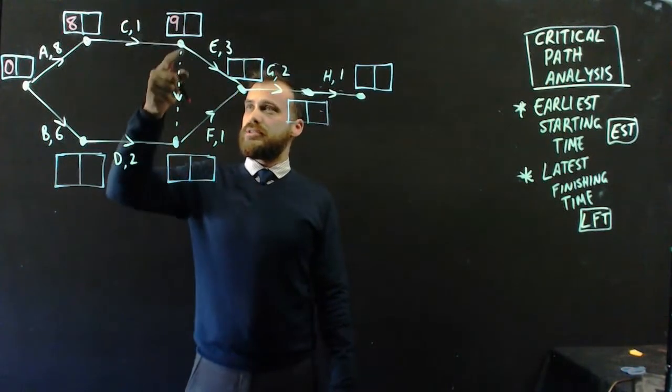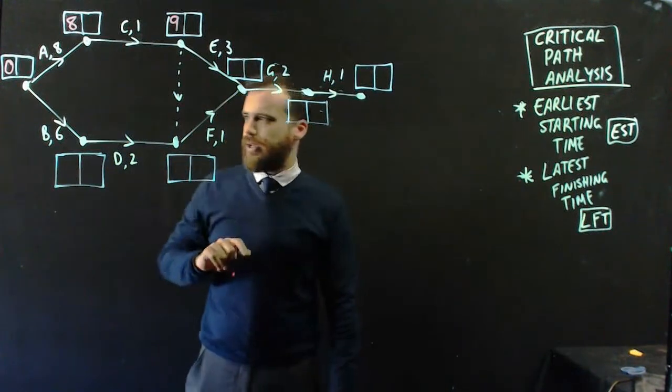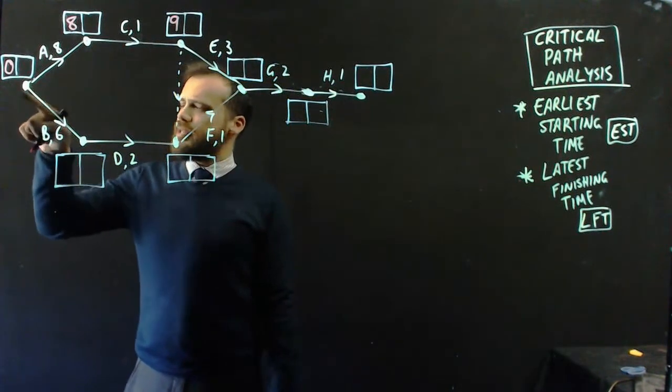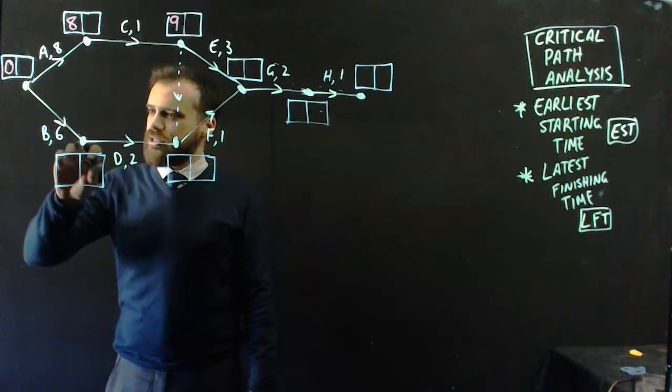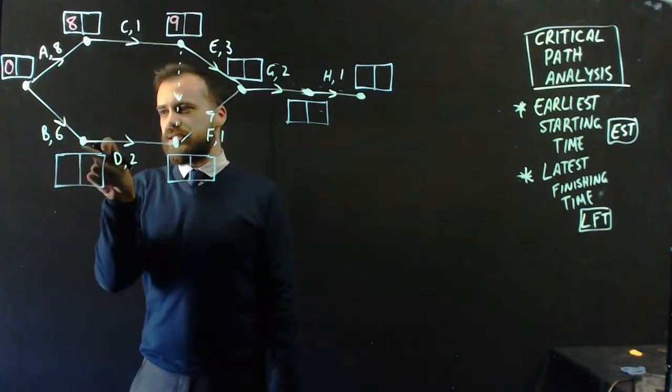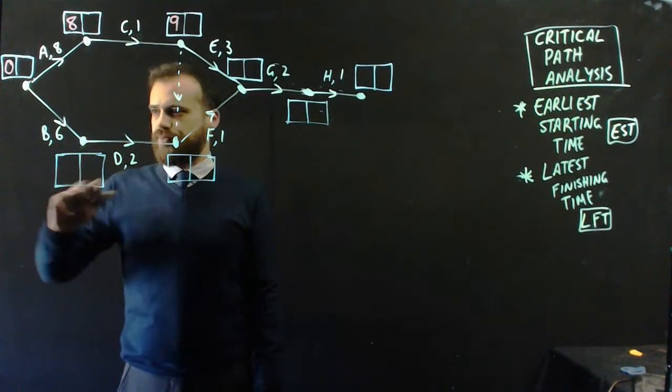Now let's keep following... No, let's go the other way. What about B? Well, B started at the whistle, and it took six hours to do. So that means it takes six hours to get to this dot. Six.